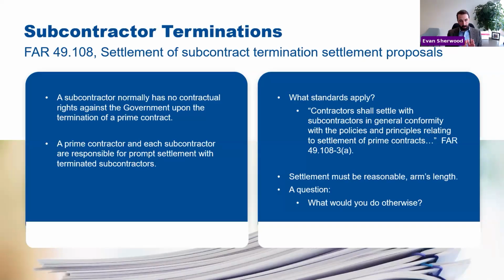I want to pause and spend a few minutes talking about subcontract terminations. If your prime agreement is terminated, you probably have subcontractors, vendors, and suppliers who are supporting that, who you don't need to the same degree, or maybe at all. These can be, in my experience, some of the largest elements of your termination settlement proposal: your subcontract termination costs. There's actually a sequence here.